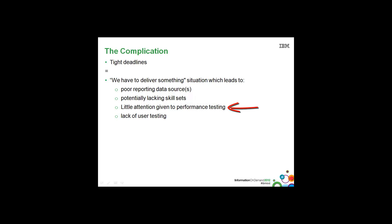And little attention given to performance testing. This happens over and over again where performance is only tested in the very last stages of the BI project and then we find that the performance is not acceptable and of course the project is in jeopardy.